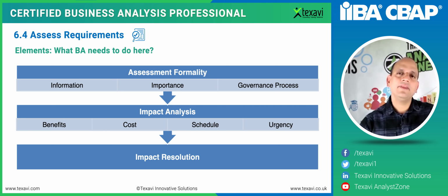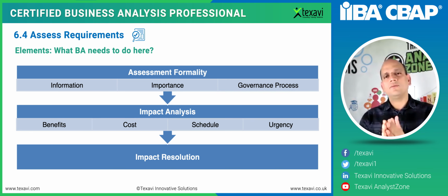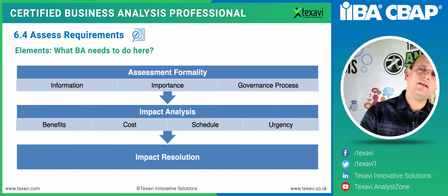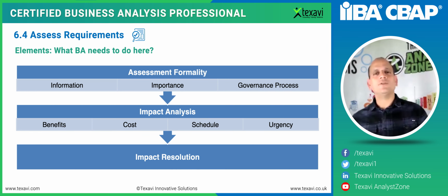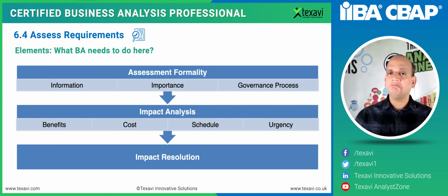Is it something where a decision can be taken, okay, yes we can do that, no we can't, or do we need a proper business case, an impact analysis report, a go/no-go decision, a proper 100-page report that we put to the project change control board? The board goes through it, adds their own addendums, and creates another huge report of 1,000 pages that gets pushed up into the organization change control board.